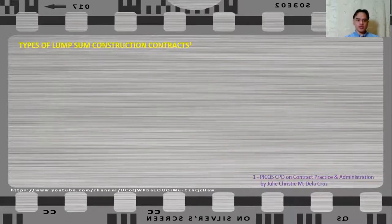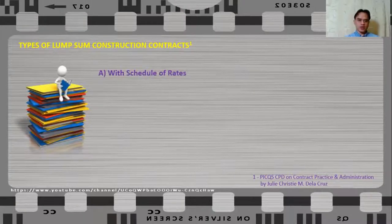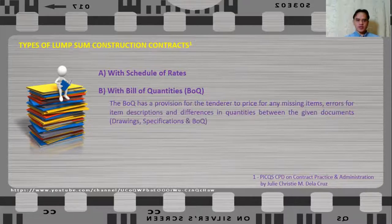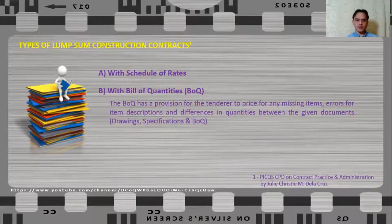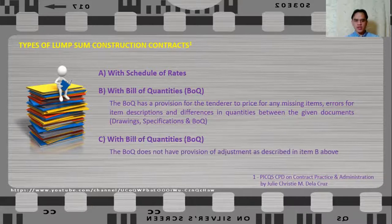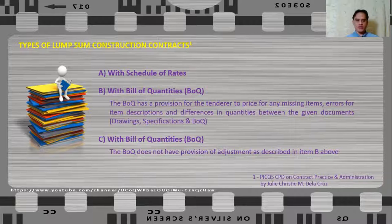Let us now talk about the types of lump sum construction contracts with respect to contract documentation. First, we have a lump sum contract with schedule of rates. We also have a lump sum contract with bill of quantities, which has a provision for the tenderer to price for any missing items, errors in item descriptions, and differences in quantities between documents such as drawings, specifications, and the BOQ itself. And then there is a lump sum contract with bill of quantities that does not have a provision for the tenderer to make such adjustments. The effect of these documents, particularly in valuing variations, will be discussed in a future video on contract administration.